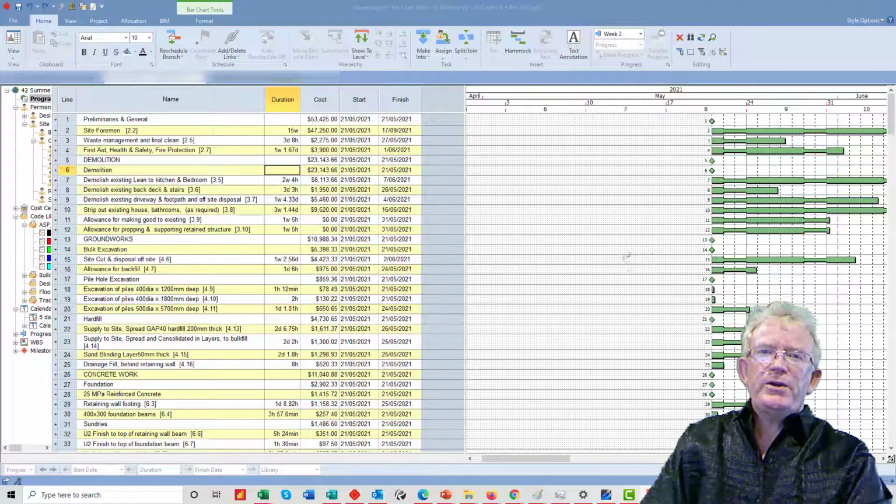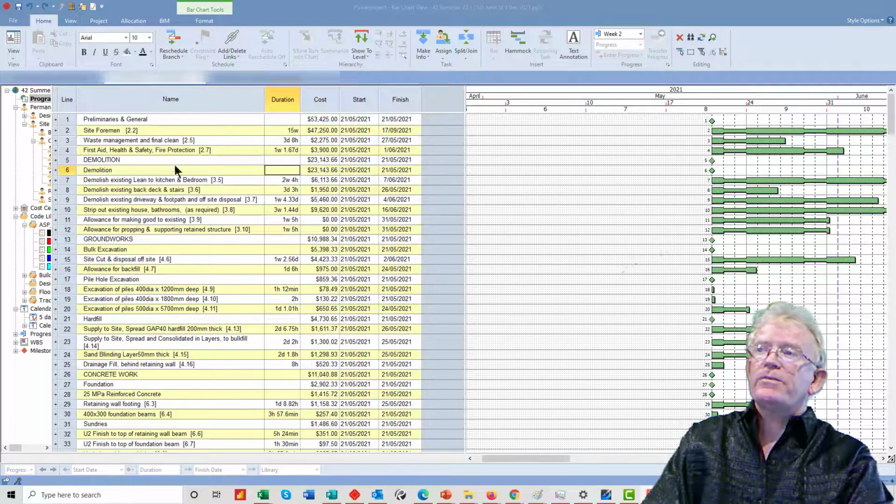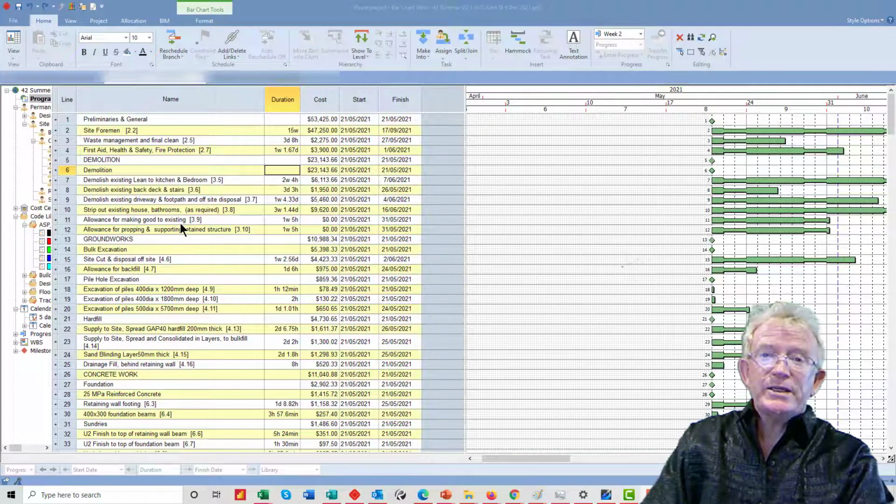In my previous video, I showed how you take a quantity surveyor's report. Now keep in mind that a QS's report will have detail like the total cost in hours, and we've imported those figures into Asta, and you'll see them laid out here. Once I have the data imported into Asta, what I need to do now is sanitize it for the purposes of creating the program.